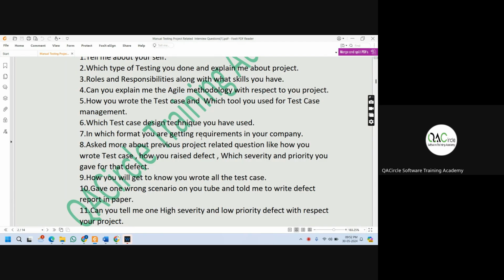The requirement document will have CRS points. The BA might have got it that way, or the BA might have prepared it. And how you actually get the points in the sprint planning meeting: the BA is going to convert those into acceptance criteria in Jira, and that is what has been explained to everybody in the development team. When I say development team, I mean everybody: developers, testers, everybody. The BA explained it as the acceptance criteria in the sprint planning meeting.